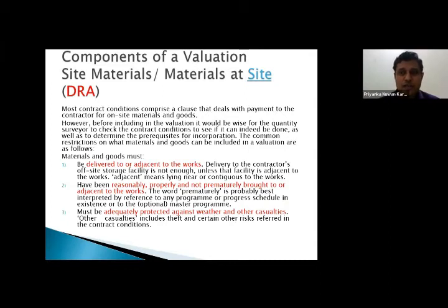But if there is any sort of flooding and you do not protect that place from flooding, maybe on a holiday or any non-working day, then the contractor will be in trouble. It has to be adequately protected against weather and other casualties. So even for materials at site, the contractor has a huge responsibility to maintain them and claim for them in a proper condition, right?